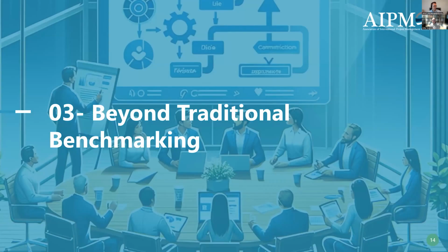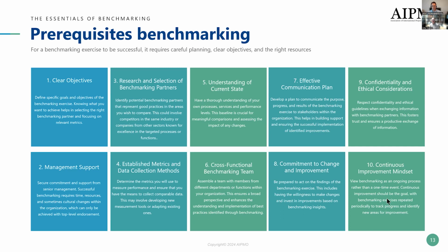And then the only other one is that it takes about 12 to 18 months to actually go through a maturity level. So it's not a one-time event. Once you do the first assessment, you have your improvement plan, part of your MBOs, managing by objectives, and then when you're ready, you do the next assessment to see whether you moved up, irrespective of whether it's an internal or external assessment that you're doing.